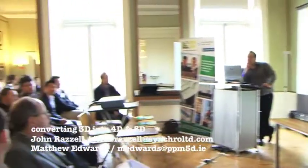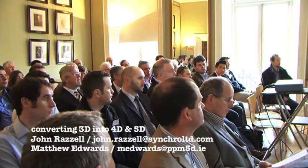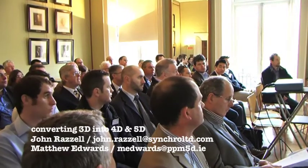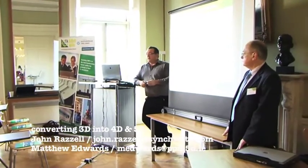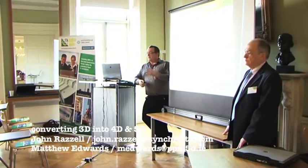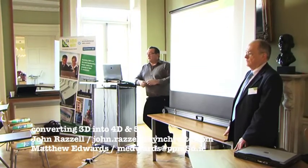So we're fairly open to what we're getting in the system. Can I ask, Martin, the machine that has Synchro on it, does it need to have the planning software on it also, or can the planner plan it and send it to the Synchro guy? The planner can send it isolated over to the guy who's got Synchro. He either sends over a file in XML format, which you can save from Power Project, or XER, and then sends it over into Synchro.